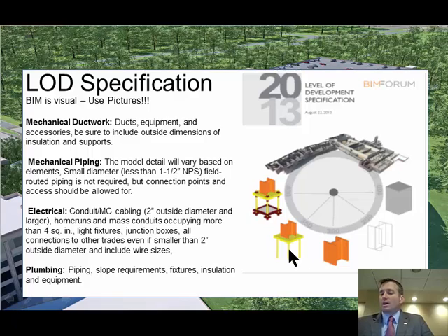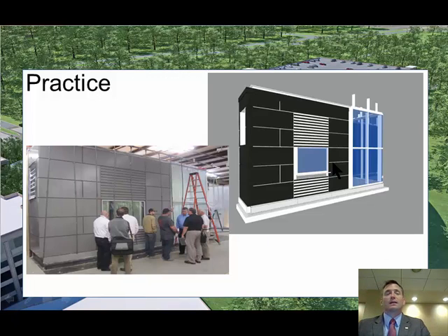And so you've got to have a plan rolling into that. And use the BIM execution plan. Use the Penn State BIM execution plan. We did our own BIM execution plan because I found the Penn State one to be very thorough, and that thoroughness is a little more than most people are willing to bite off the first time in. Okay, so if you want to get into that, you can. Just let me know and I can give you all the details you want.